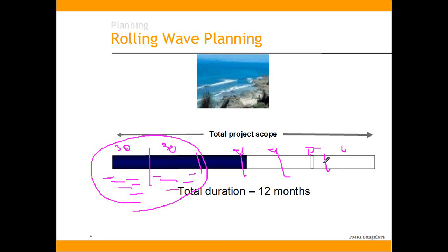And all these agile projects are built on this actually. If you take Scrum or extreme programming and all, they have a roadmap, and for the current iteration they have fully blown activity level details, and things falling beyond that, it will be only at a very higher level, roadmaps kind of thing. So yeah.